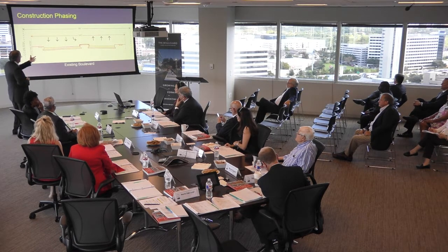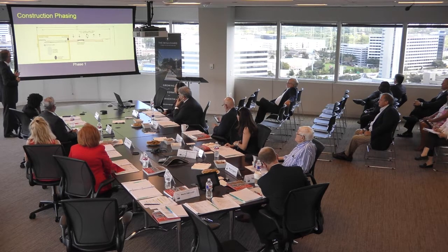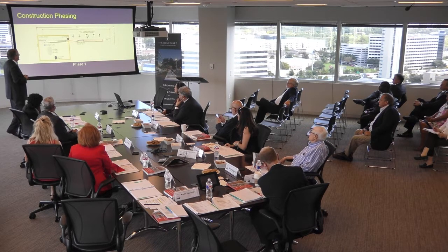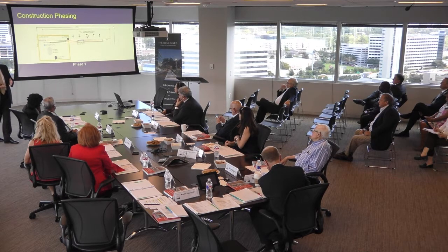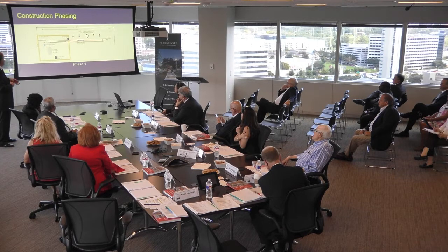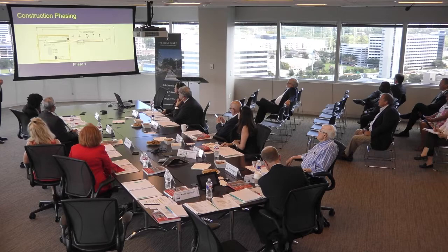So here we are. We have a median today with our left-hand turn. We tear that median out. We pave it over, and then we put traffic on it. We have 2 lanes in each direction. We have our left-hand turns at signalized intersections, and we're able to build our utilities and our new 3 lanes on Post Oak Boulevard as well as the sidewalks.